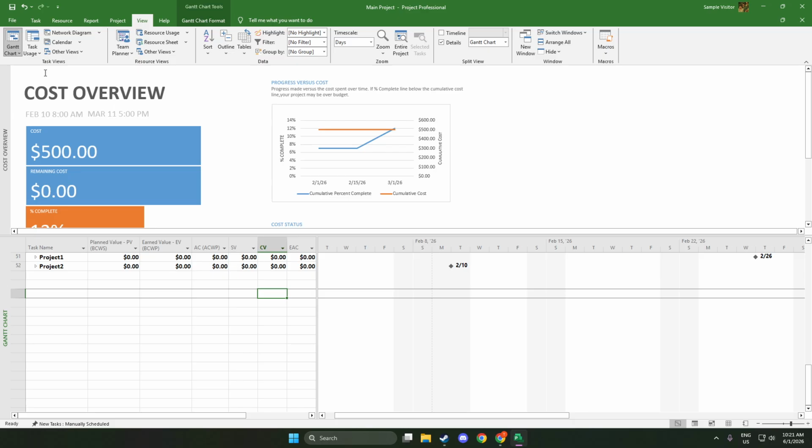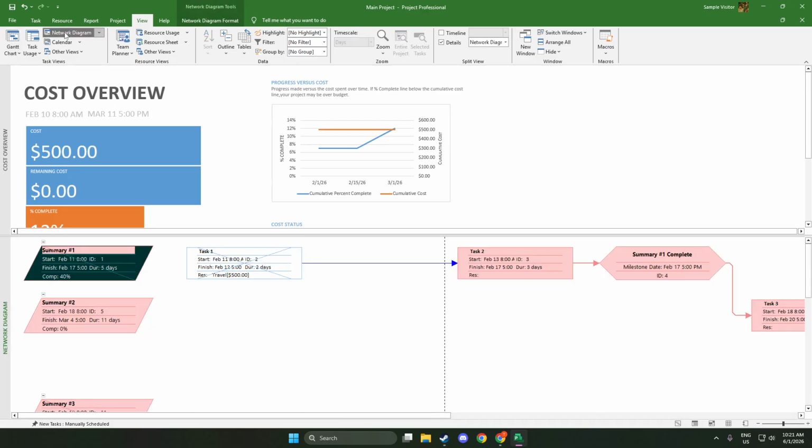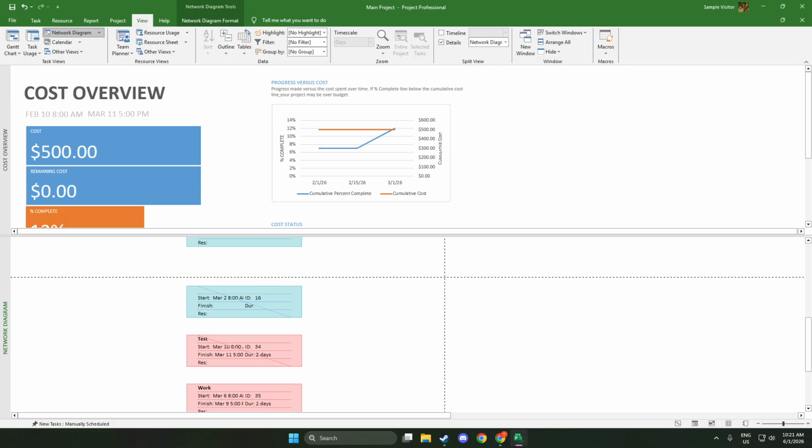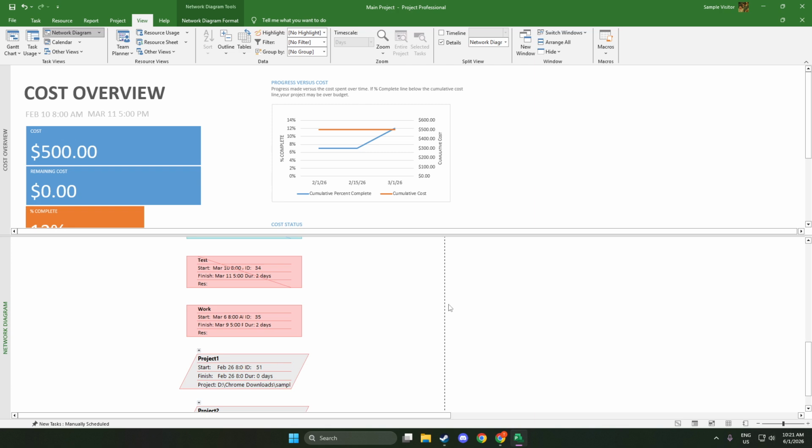On screen, you'll see a series of nodes, each one representing a task. Inside each box, you'll typically find the task name, ID, and duration, and sometimes additional details depending on your configuration. Arrows connect these boxes to show predecessor and successor relationships, the sequence in which work should proceed. Read it generally from left to right, following the directional flow of the arrows to understand order and impact.